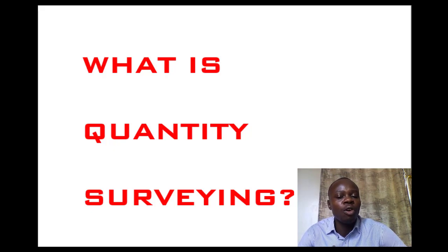So for example, whoever the final consumer of the products from the quantity surveyor would be, for example the client, you'll be seeing a price or a rate, but you won't really understand how this came about. The rate is normally what we call a unit rate. That is what we use to prepare the bills of quantities for you. For this unit rate, we will be talking about prices of materials, the cost of labor, the machineries, and also items like transport, overheads, profit of the contractor, and so on.